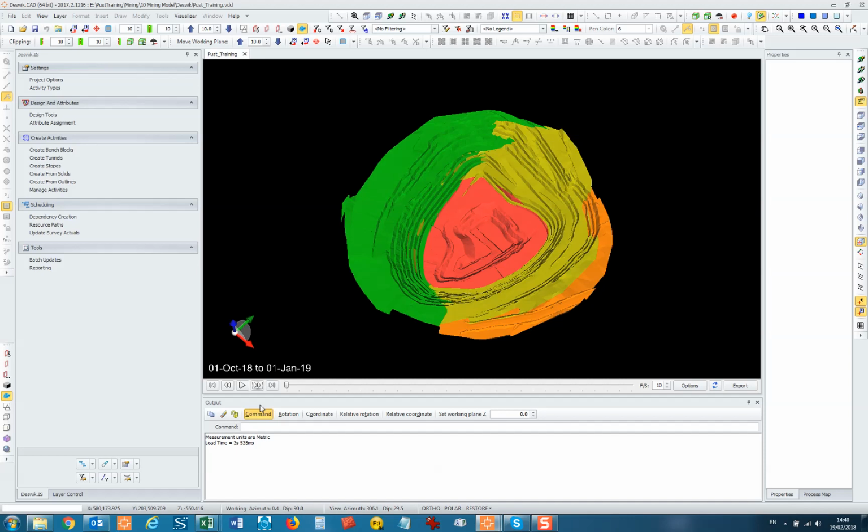Equally, if you have a high-grade stockpile, so in this case we have a high-grade stockpile because you need to mine more high-grade to stockpile it to then rehandle to the mill to fill the gaps. You have to allow the stockpile to be built, but then when you don't want any more high-grade stockpiling, you want to direct feed from the pit, you can physically say, using the constraints, no more high-grade to the high-grade stockpile. And you limit and you say stop. So it's all about using the constraints in combination with the report.